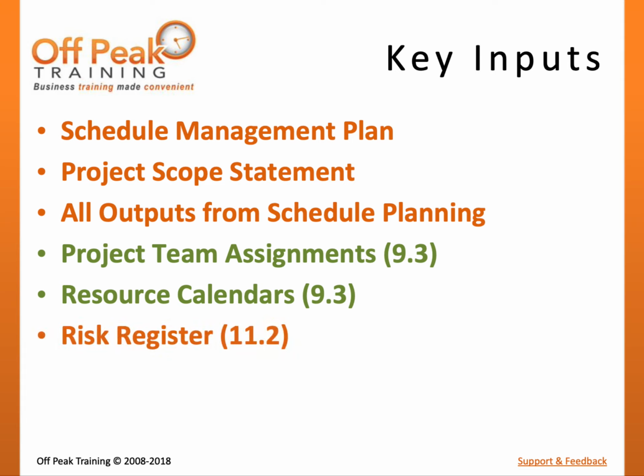The risk register may contain risks regarding the amount of time it will take to complete an activity. Therefore, develop schedule should be revisited alongside the risk planning processes.